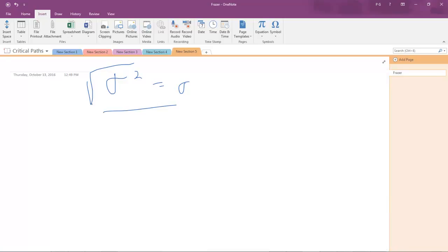We're calculating the variance here, and the ultimate equation that we're going to use, and I went over the z-score for a reason, is that we're given as part of PERT that z is equal to some time d, that's our point of interest, minus the expected value of the path.